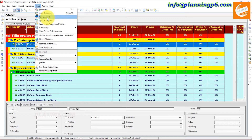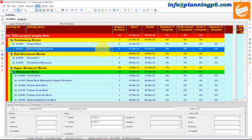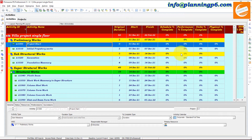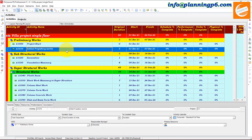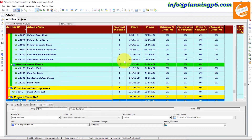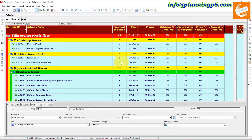What it will NOT complete is the milestones — the project milestones will not be completed automatically. Also, activities that have no resources assigned will not be updated with this option. You have to update the milestones and activities which have no resources manually. For example, these two are milestones — this start milestone and these finish milestones. After applying actuals, these activities will not be completed automatically.